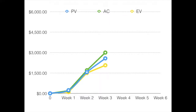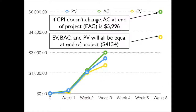So if we look at this, what we're really saying is if CPI doesn't change, the actual cost at the end of the project will be $5,996. Remember that our EV, BAC, and planned value are all going to be equal at the end of the project.